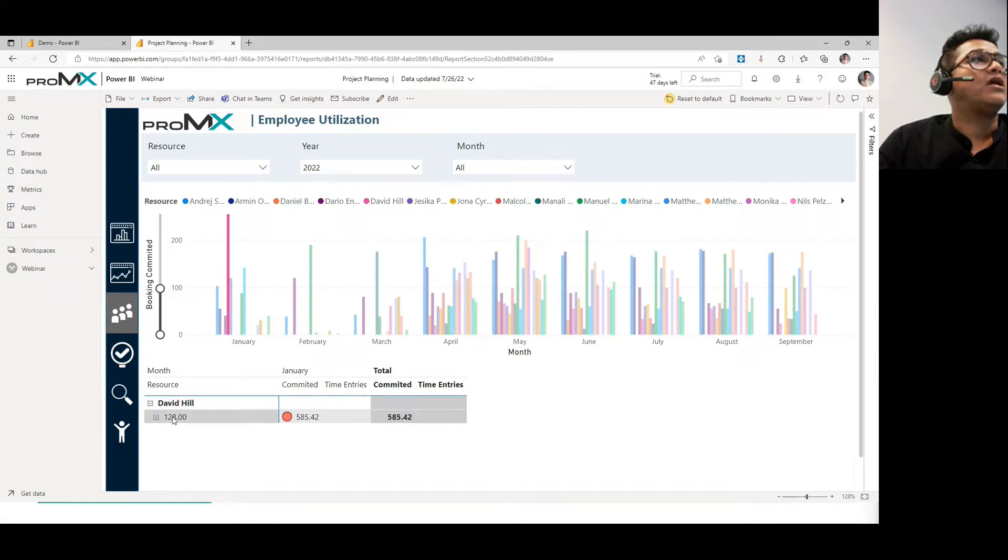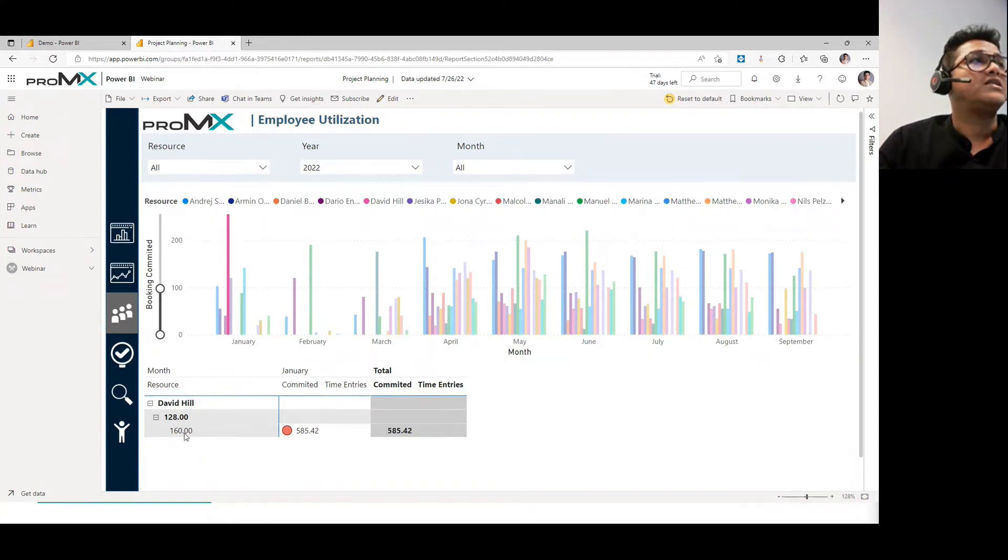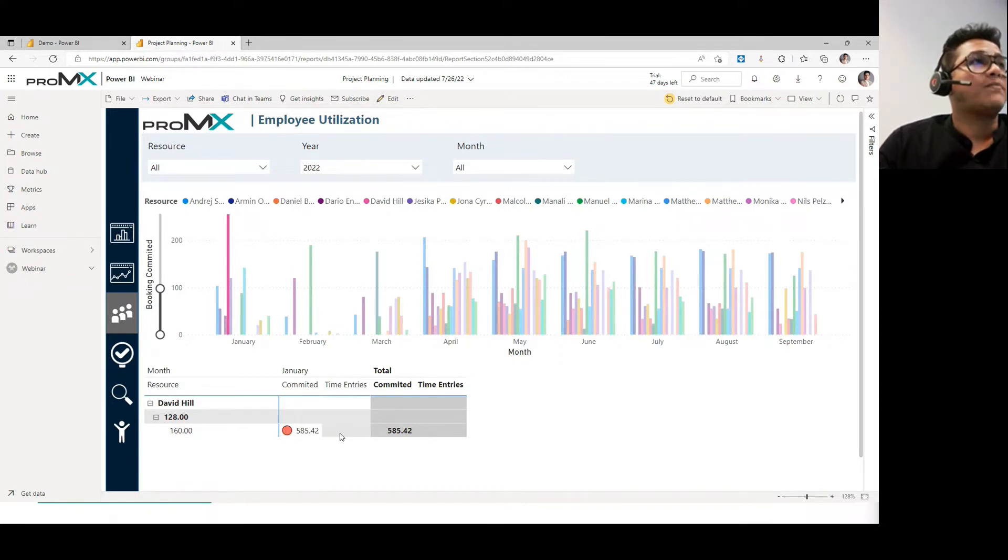But if you click on the plus, you can see David Hill's capacity is 160 hours, but he's booked for 558.42 hours.